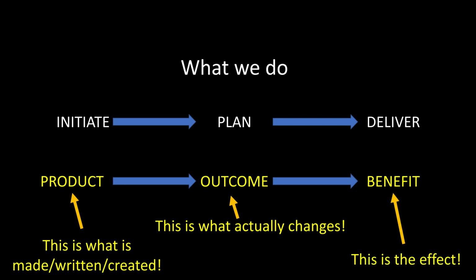That change should lead to benefits. So if we're talking about something like a process, it might be we wanted to make our process more efficient, therefore saving time and money. So we've written a new process. We now operate in a different way because something's changed. The outcome is we now do it this way, and the benefit is that we've saved time and money. So it's important to understand those three things are separate from each other.